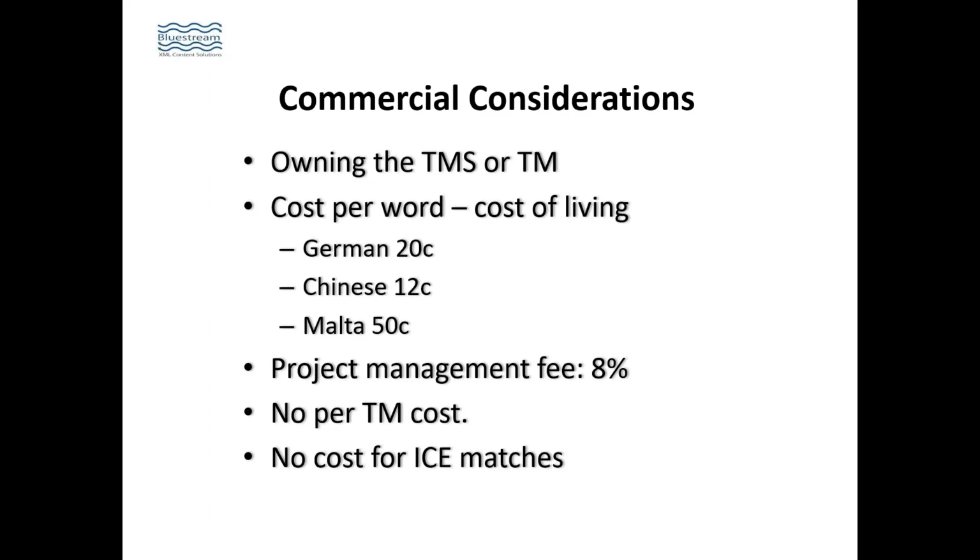I think you want to make sure that you own your TM. You don't need to own the TMS, but you can own the TM. You've got to check your project management fees. Sometimes all you get is an overall project management fee, period, and then on top of that, your per-word cost, which is a nice way to do business instead of having hidden costs by the LSP.